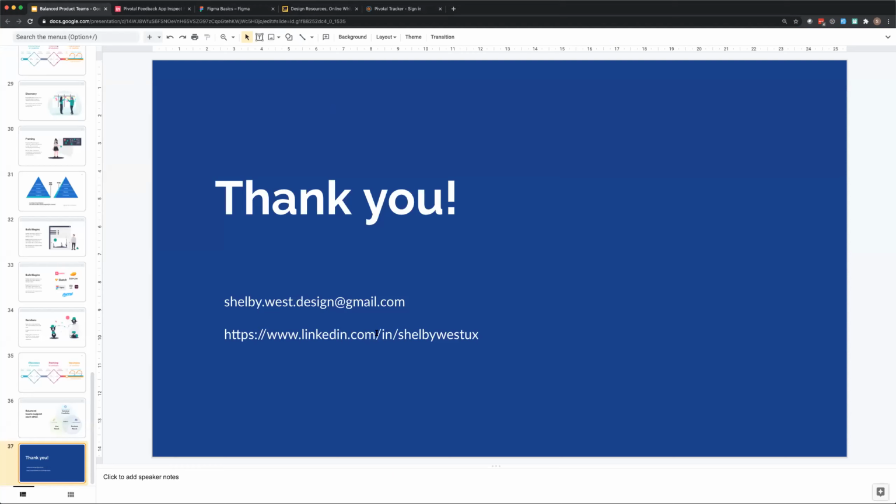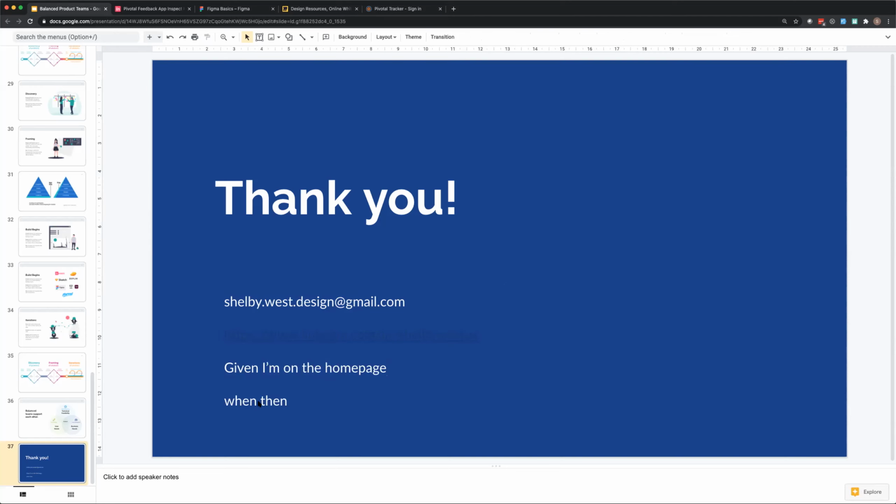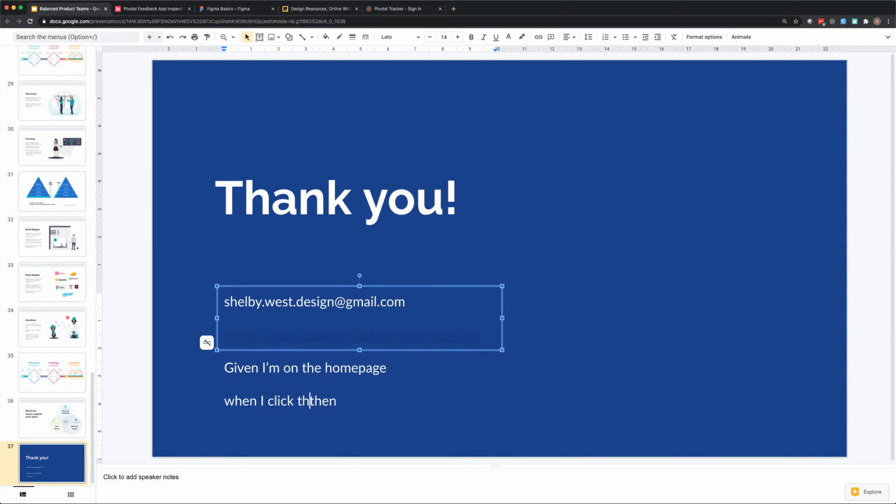So how a story gets written is typically, I'm going to have to sign in with my VPN to do that. So you would write a story as given, when, then. A story is going to provide all of the acceptance criteria for what needs to happen, what a user needs to be able to do to complete that feature. So we're going to say, given I'm on the home page, when I click the print button, then the browser print dialog opens.